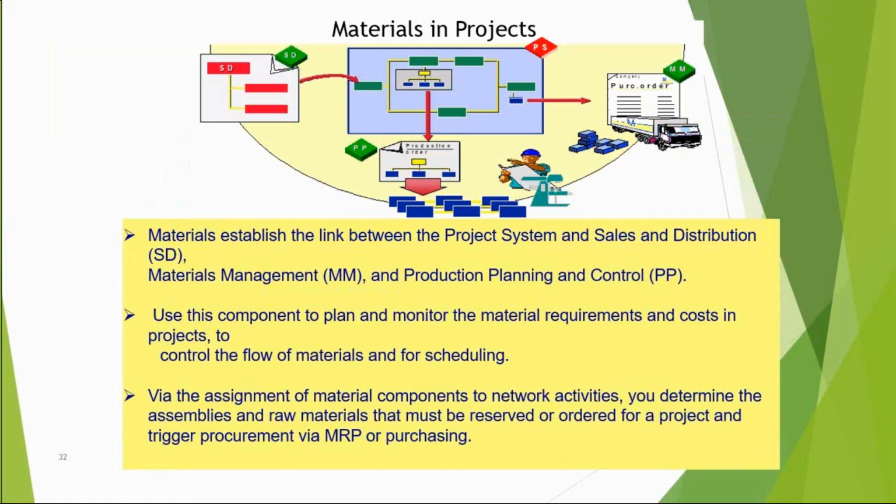And materials management itself is very much integrated, because I have to run my procurement cycle. And why PP, production planning, why has it come? Whenever I'm doing my internal production, I will be assigning an internal order to my internal activity, and MRP will get generated. Once it is done, if the stock is not available, again the cycle. If stock is available, directly it will go for production planning, and the finished goods, FG, will come and sit into my activity again. Once I do the GI, goods issue, either to sales order or directly to the customers, this is how the cycle is. Okay.